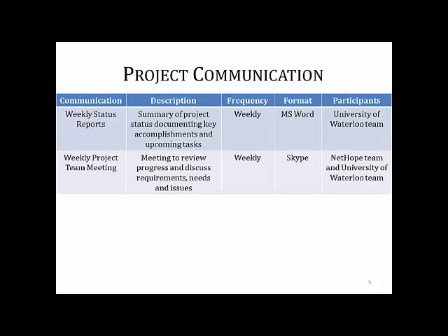Project communication. Throughout the course of the project, the team was in constant communication with the NetHope team and Professor Carr. This was done mainly via emails, but there were weekly status reports done on Microsoft Word, and the main participants of that were the University of Waterloo team. The team created a summary of the project status and documented key accomplishments from the previous weeks and highlighted upcoming tasks and issues.